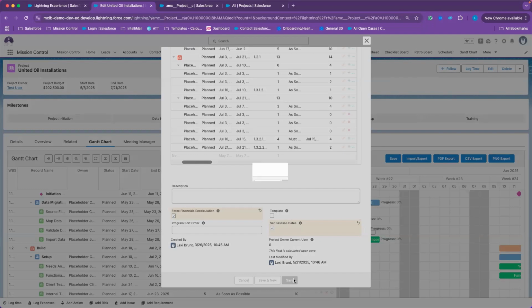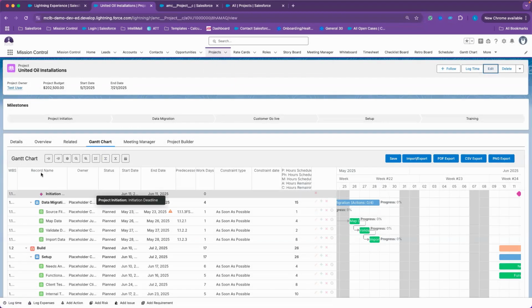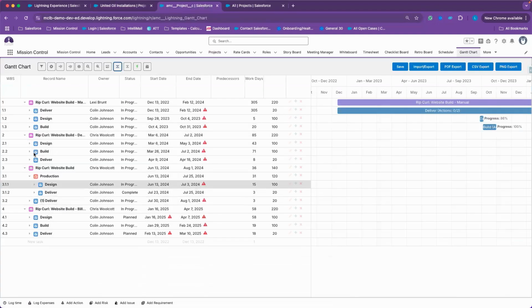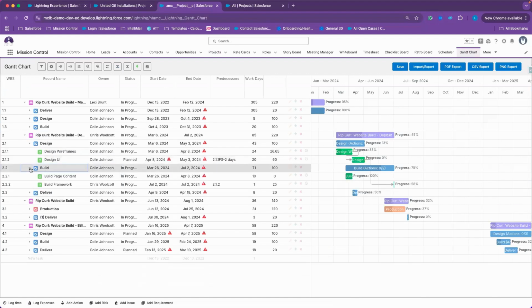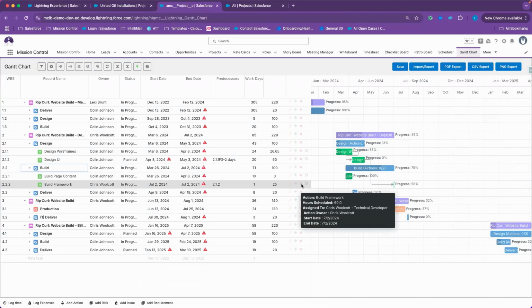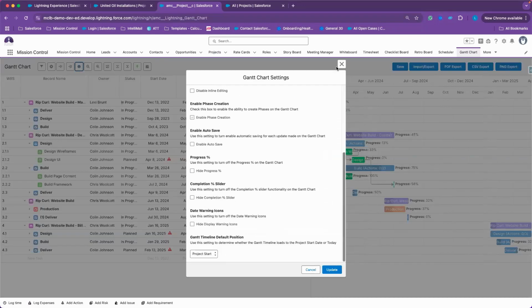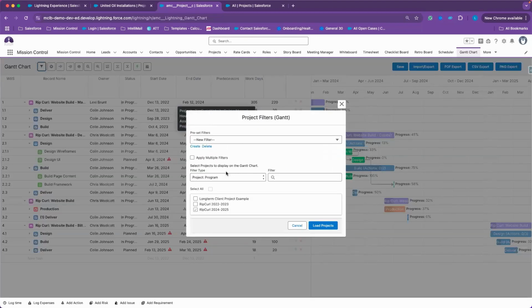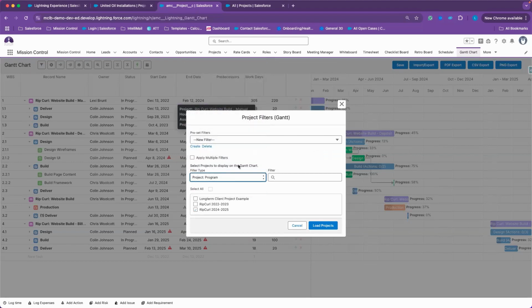All right. Can you filter the Gantt view to critical path? So within your project-specific Gantt, you will not be able to filter to a certain area of the project. Now, you would need to determine how the system will recognize those dependencies as a critical dependency before you'll be able to filter by it. So whether that's a custom field that is created to determine, hey, this dependency is critical or not, and then you will use your filters to modify them from there based on that custom field. And you can also choose to save your filters as well.